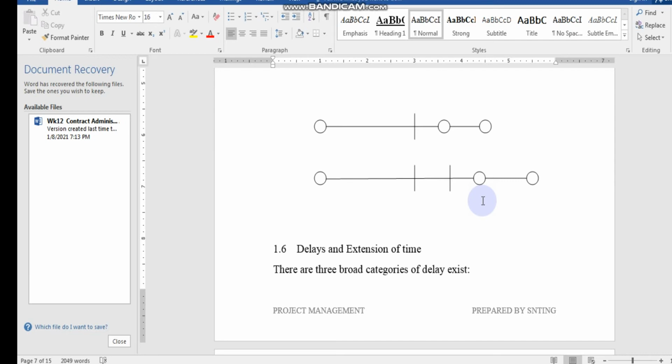And when you're handing over the work to the client, this is something I want to talk to you about as well. It has to be a proper request for the client to come and check. And usually for a lot of development projects, you will be basing it on authority. So meaning the bomba has to come, the road certificate has to be issued, the OP will be issued. So all this will require the authority to come out and check, so you have to be well prepared for it.